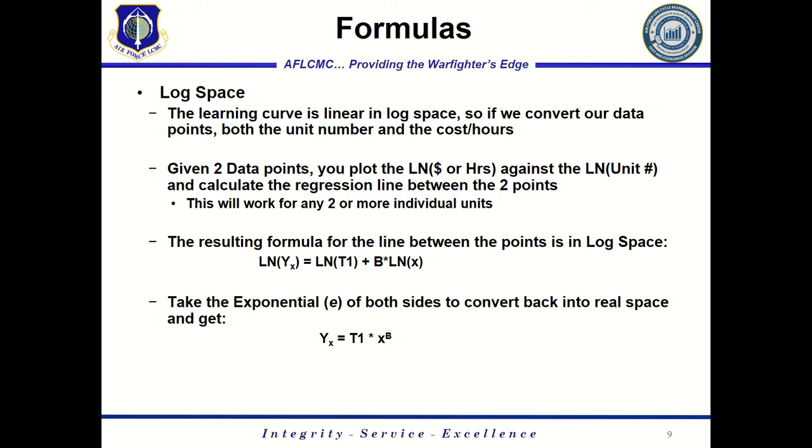And again, this reiterates a lot of what I was just saying. We convert the data to log space. It could still be dollars or hours, it doesn't matter. We also need to convert the unit number if we have the unit number. If we don't have the unit number, we need to assign some kind of unit number. We usually use a lot midpoint, right? So we've got so many units in the lot that we have data for.